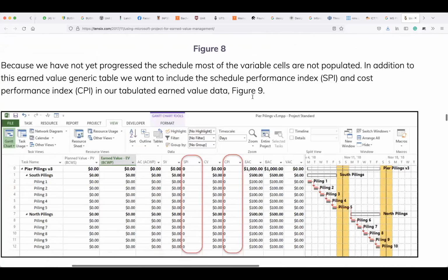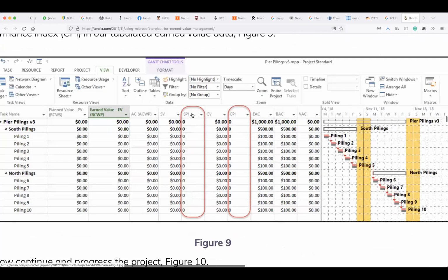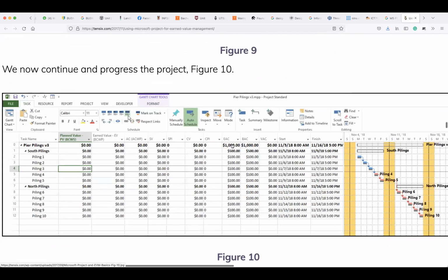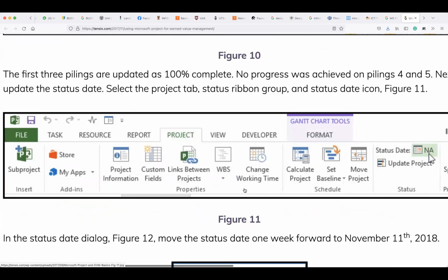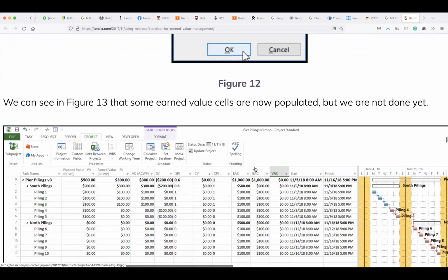I'm actually working well. If I see here, the same thing, SPI, CPI, EAC, BAC, these are all the figures we're telling you about. So after you plan, you need to save a baseline in Microsoft Project. After we do that, we are able to start comparing how we are really progressing in terms of our performance. We could use all of these indexes, put them in Microsoft Project, and we'll be able to see the figures. You can see here the same thing being calculated, but really it's just about inserting a column. Whatever column you would like, you insert it in Microsoft Project, and it starts comparing how much you've earned, how much you are planned to earn.